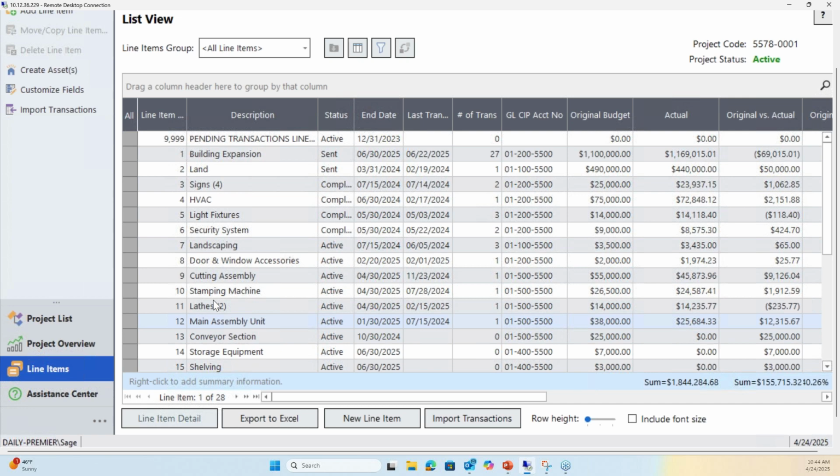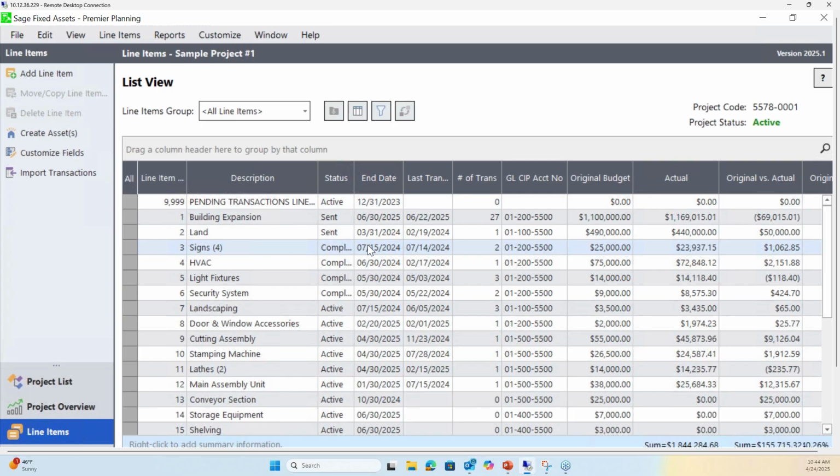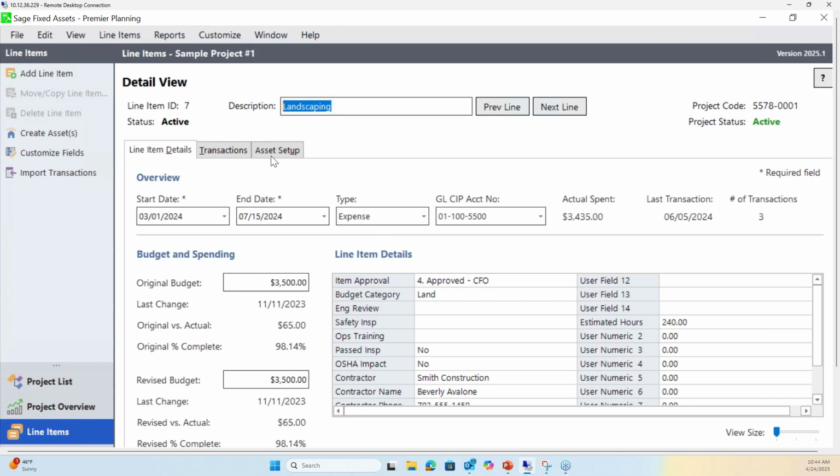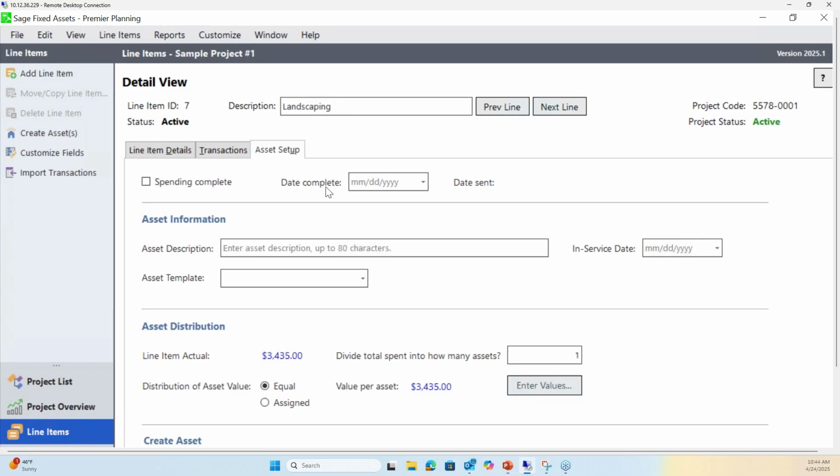Okay. So once I do the project plan and create this information, like all the fields in this integration, I can also create it as a template. So if I go to utilities, I can say copy project setup. And then I can say I'm going to take my implementation project and move it to project 1, and I'm going to copy all the fields, all the field entries, and the view layout, since I got it all standardized the way I like to see it, and all the integration fields that move over to that automated workflow into depreciation and or into tracking. And now I want to keep reusing that.